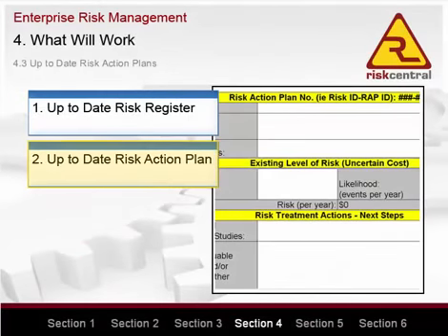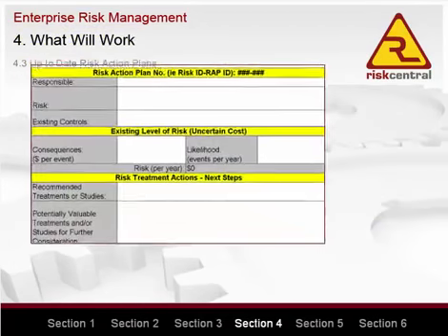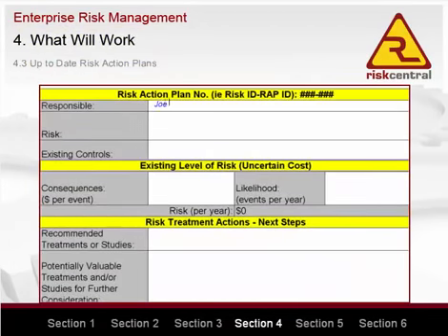2. Risk action plans document the plans put in place to manage significant risks. The person responsible for each significant risk should be responsible for the production and maintenance of a risk action plan for that risk. The risk action plan for larger risks should include business cases or a cost-benefit analysis to select the most appropriate controls. This may also include an analysis to determine appropriate residual risk levels. An appropriate risk level may be based on balancing risk and return.